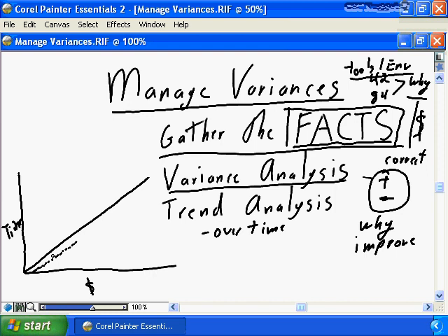It may mean that, but as you're doing your trend analysis and doing this over time, all of a sudden you realize that it's trending upwards. And we have now passed the baseline, and it may be that the project is heading for trouble. If it continues in an upward direction like that, absolutely the project is in trouble, and we need to take actions. But let's say that it trends upwards, and then it flattens out, and again, it's going absolutely parallel to